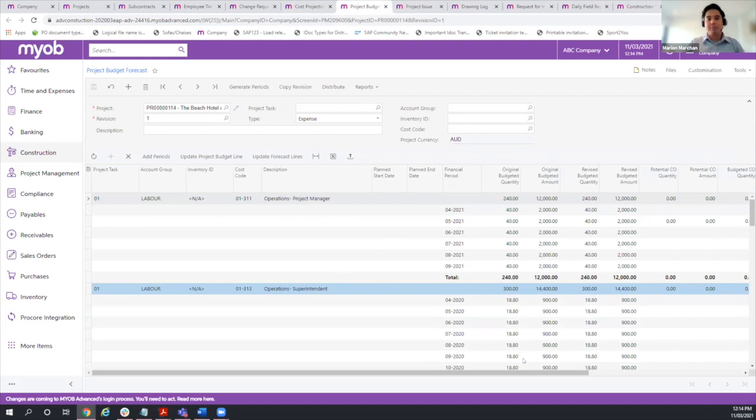You don't want materials sitting on your job site early, so you purchase them to be delivered just when you need them. This is a way to represent that better in terms of when you actually need to pay your suppliers.